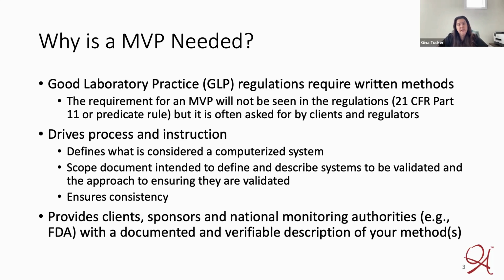Master planning actually began within the industry as a way of organizing thoughts and controlling costs. At the time, validation costs were running potentially as high as, I would say, approximately 13% of the total cost of an installed project. But today, through the implementation of validation programs and robust training measures and stakeholder acceptance, validation makes up approximately 8% of a project's budget. So you can see by introducing consistency and efficiencies into the program, we're able to reduce cost overall.